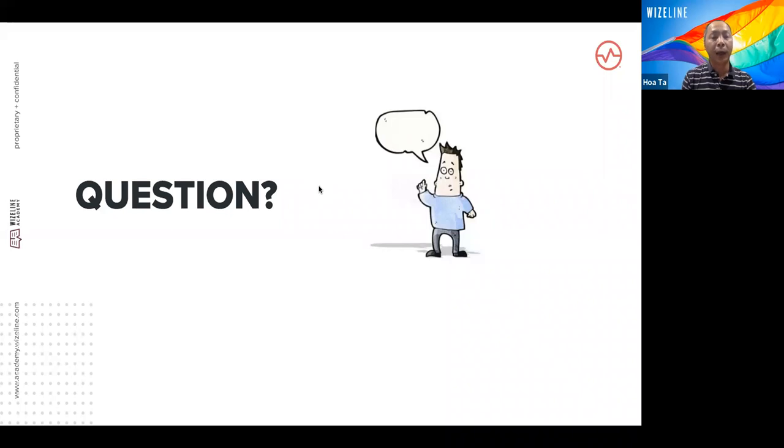But let's say you have a team of Java developers and now they move to a Python project and just a few members in the team understand the Python language. Then you need to buffer more because they need some time to learn, and sometimes they never expect some challenge that they may face during the time of development. So I cannot give you a very specific number. It depends much on historical data.